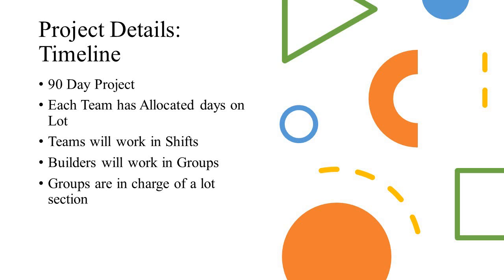A site supervisor and volunteer coordinator must be on site at all times when construction is taking place. Cannot stress this enough. This is for safety and regulations. If there's any sort of issues taking place, the site's coordinator needs to take action. We can't have the volunteer coordinators handling everything, or have a union guy getting hurt on the job. So that is mandatory for this timeline and what needs to be going on during this project.